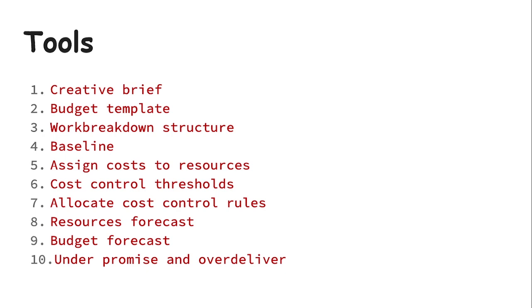But you know that you already put it in your budget that actually with this budget I can exceed the clients' expectations, so they are happy to know that. But for you, it's just at the back of your mind that, you know what, I can actually do more with the budget, or in case of any other risks I can actually tap into the budget I requested. So that is it in all budgeting process. You have to make those anticipated risks and also know that there is always a backup budget left of the budget for this project to cater for other costs.